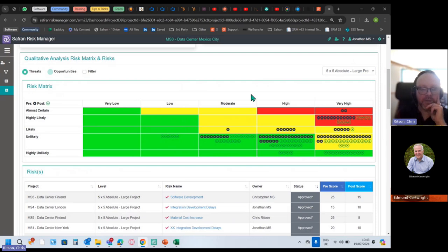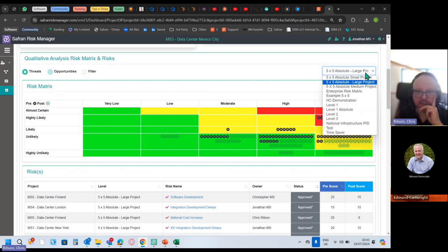I'm not a huge fan personally of these risk matrices. I think all you ever really need is a 3x3 to very quickly refine: is this a material risk or not? And if it is a material risk, is it actually worse than that? Is it some kind of existential risk? So I tend to want to see the world in very simplistic terms. Not a risk, stop wasting my time. Yes, it's a risk, I'll get to it. Oh dear, I really need to prioritize that column.